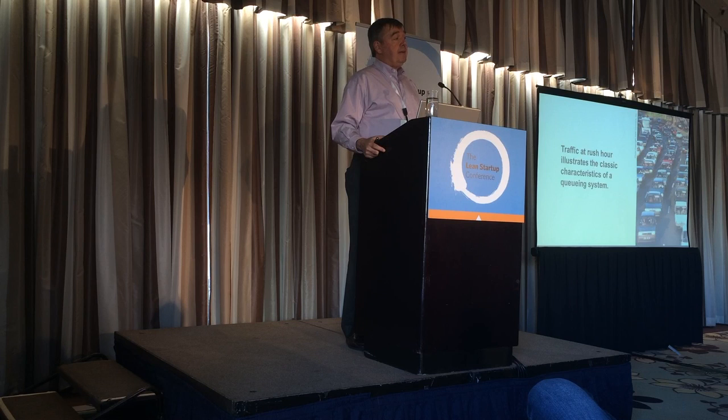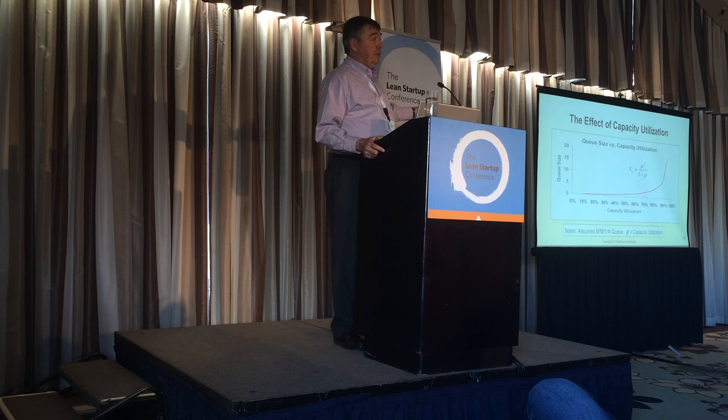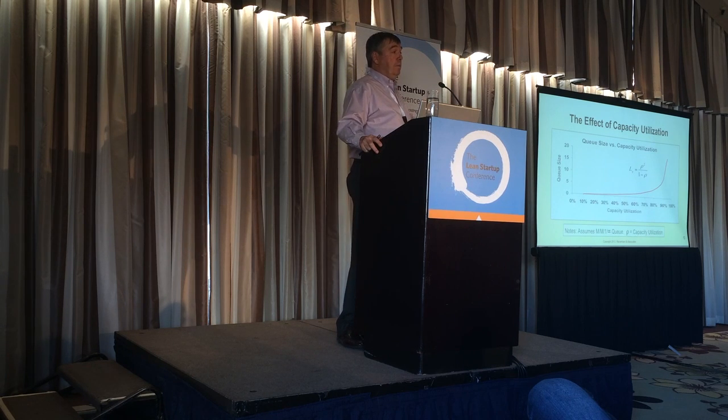Remove 1 lane of capacity at 3 a.m. in the morning when the system is lightly loaded, you see no change in cycle time. So your life experience with traffic shows you exactly what queuing theory would tell you, which is that changes in loading have a nonlinear impact, and the nonlinearity depends on the level of capacity utilization. And that is precisely what real queuing theory shows us. This is the queuing curve for what's called an M/M/1 infinite queue. It's a classic queuing system.